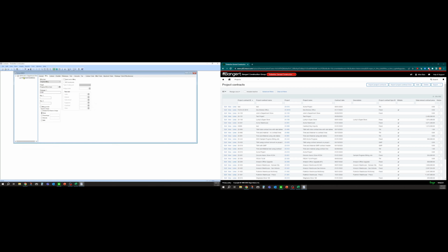But you got to know all that each contract. We don't have to know that there. We can set that up behind the scenes ahead of time so we don't have to pick that every time. Do I want retainage on this line specifically? So let's say, yep, I want 10%. Okay, do I need to fill out anything else? Not sure, but we'll keep moving on.